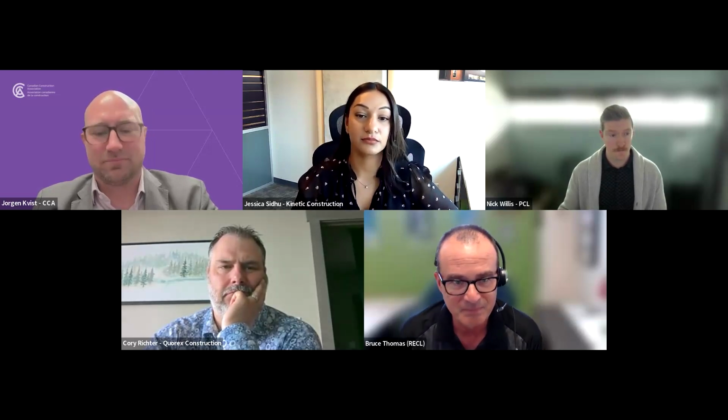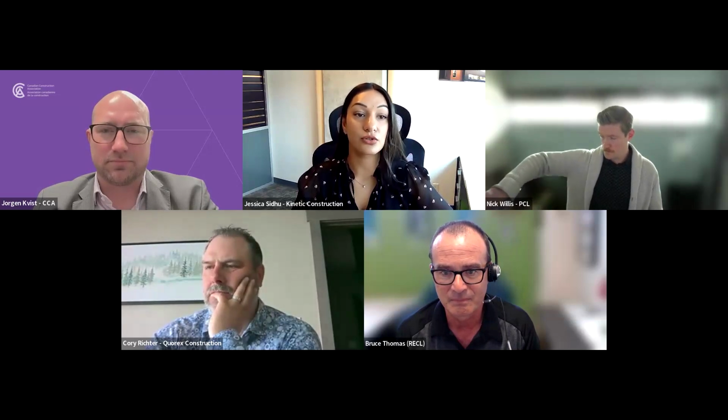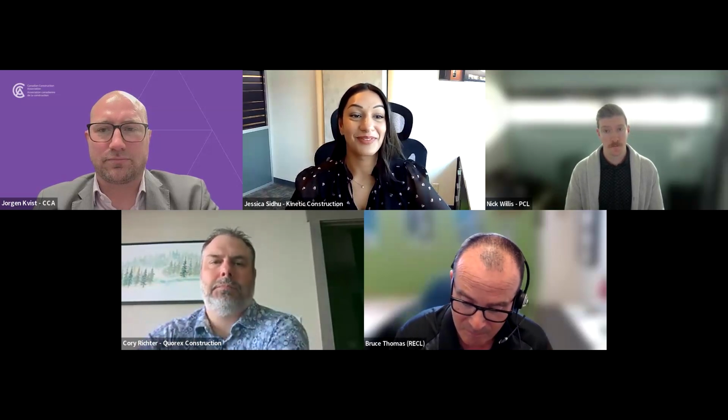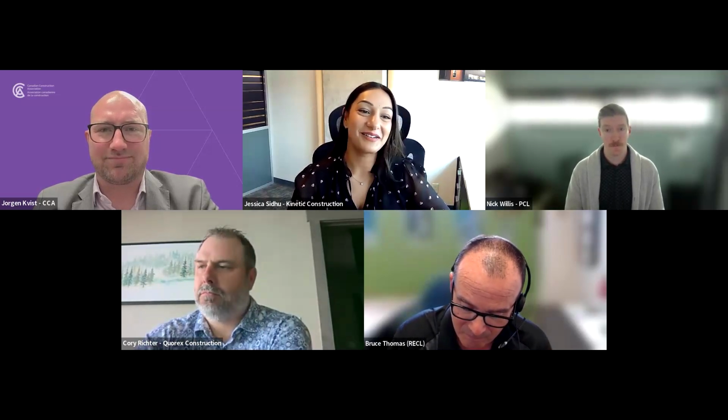I can add to it. The person asking the question is definitely right here. It does depend on the size of the project, the complexity, the experience of the person involved. It also depends on the additional supports that are in place. Are there other managers able to support should their involvement be needed for any items that are escalated? And on the other end, do they have a junior person supporting some of the administration that could be delegated on a day-to-day basis? When it comes to a contracts manager, it's hard to throw a number because I don't want to be held to it, but anywhere from one to three mid-sized projects.